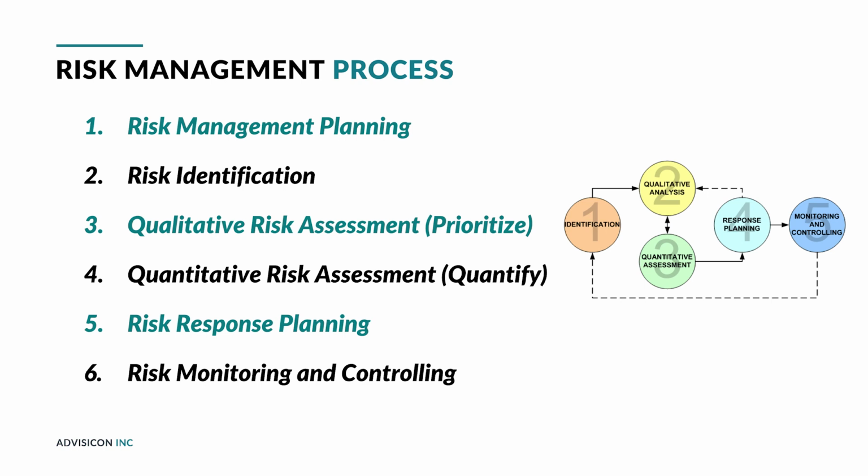So if any of you have heard of the Monte Carlo simulations, you can use a variety of these tools to quantify the risks. So you use the qualitative first, and then quantitative necessarily follows all of that. So you really use the quantitative to drill down on the ones you've identified during the qualitative assessment, and see which ones are higher profile.